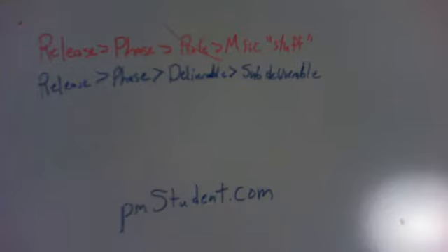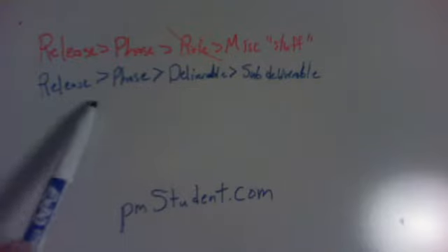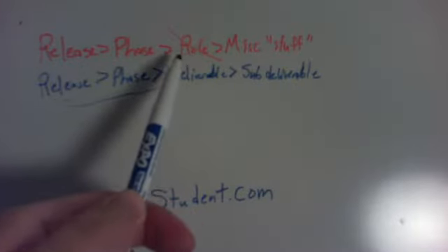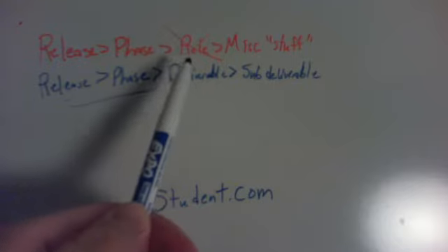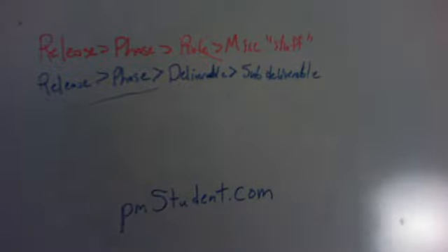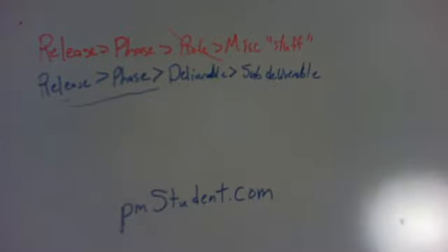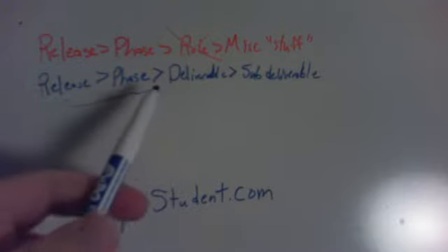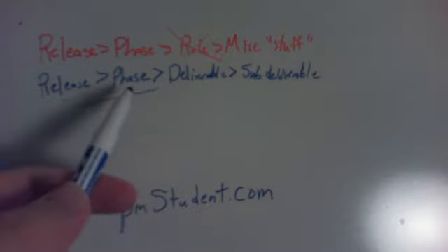So what we did is got together with the team and took a look at their work again. And this first part was fine. The release through the phase, that was just fine. Really, this is where we started having problems with how the work was organized. Things were getting missed. There were things that we uncovered when we went through this process that we had not documented before. So we essentially took and listed out all of the deliverables, everything that needs to get delivered in this phase, in this release, in order to deliver this phase of the release.